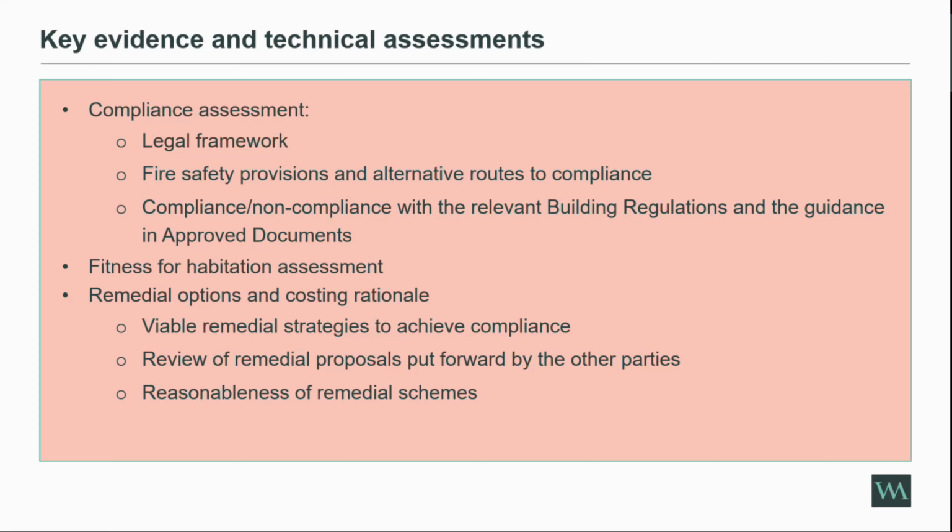And then on the same point, I suppose, is what do we know about the fire safety provisions? So was there a relevant fire strategy at the time of construction? Do we know about that? Do we have any documents on that? And do we have any evidence of any alternative routes to compliance? Is there any evidence of a fire test route? Is there any evidence of an alternative fire engineered solution? Or is it reasonable, based on the lack of evidence, for us to conclude that it was probably a linear route to compliance? And this all links to the analysis, I suppose, of all the documents.